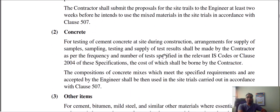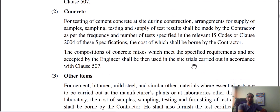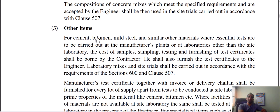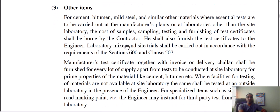There are important items covering filling, paving, and paving materials — the cost shall be borne by the contractor. For other items like cement, bitumen, and mild steel, where essential tests are carried out at the manufacturing plant or at a laboratory other than the site laboratory, the cost of sampling, testing, and furnishing the test certificate shall be borne by the contractor. The contractor shall also furnish the test certificate to the engineer.